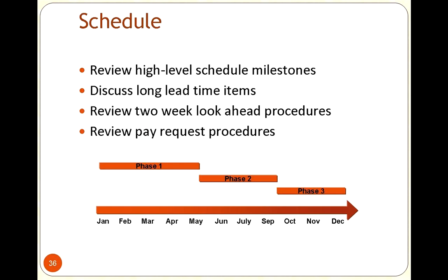That might be the case where you've got to bring in the IT folks because they need to review it. That helped with our weekly meetings because we had that 2-week look ahead and we went, oh boy, we're going to have to do some work tying into the network. We've got to have IT there. So we always forced a 2-week look ahead of our contractors.